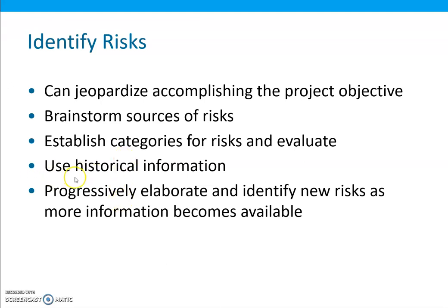Another source for finding risks is identifying possible risks from historical information from past projects. If post-project evaluations are done on completed projects, they should be a good source for identifying possible risks, as well as for getting information on how to address such risks if they occur again.